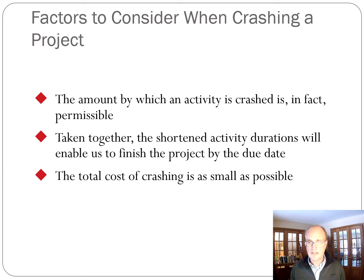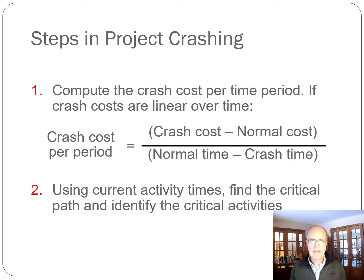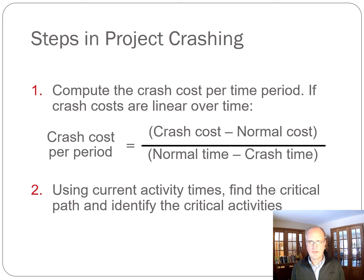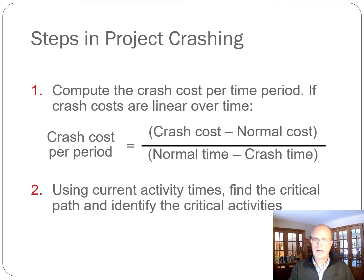The reason we do crashing exercises is to evaluate the degree to which we can do that. You want to minimize the cost of crashing — that becomes an important point when thinking about which activities to crash and in which order. Generally, when doing exercises like this, we assume that crash costs are linear over time. So you say: we can shorten it by X number of days and it will cost us this much, and the crash cost per period is the total cost of reduction.